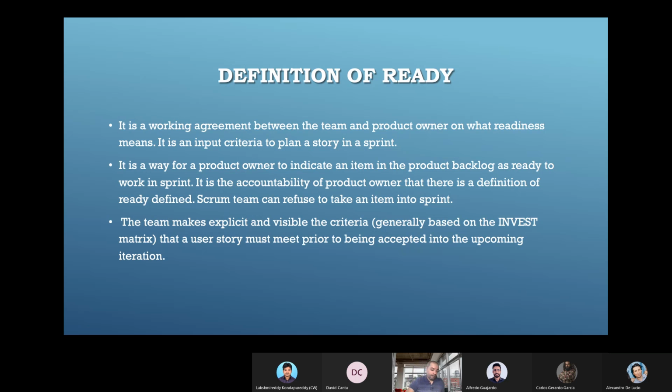When backlog grooming happens, when the product owner, scrum master, and the entire dev team discuss, when they do story pointing, and there is no doubt that from the requirement perspective everything is clarified, at that time we will say this specific story is ready for development, and only then can it be pulled from the product backlog to the sprint backlog.